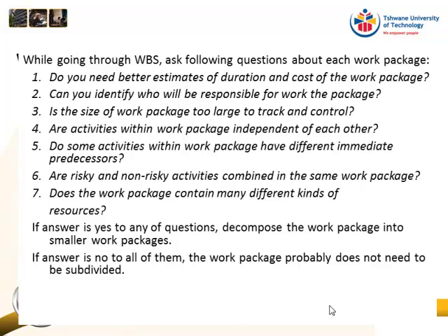But now you don't go back to work and say to your team, every work package must now be 2 weeks because that's what the professor said. Because sometimes it doesn't make sense. All right. So for me to confirm the dates with KYP took me half an hour. So now to put on the project plan that it is going to take 2 weeks because that's a work package, that just doesn't make sense.